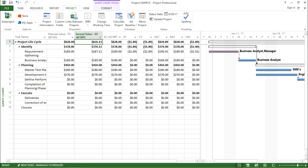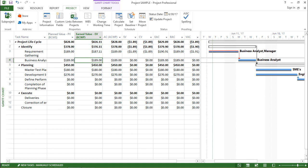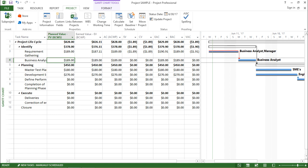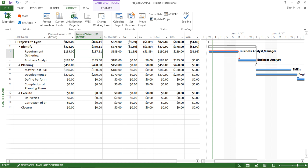This Earned Value is being considered after the work is completed 100 percent. So for some tasks where work has been 100 percent completed, the Planned Value and the Earned Value are similar — for example, for Business Analysis they are the same. But for tasks not yet 100 percent complete, it is showing a difference in the value.